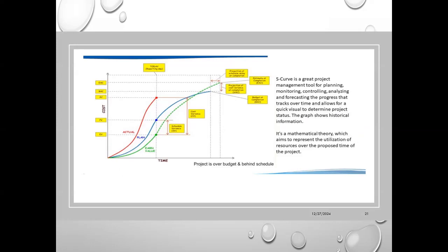Using Primavera, you can do earned value management. This is one of the important tools for progress monitoring and reporting. In earned value, we talk about the planned value at a particular cutoff date. Cutoff date means the day you take the measurement, and the actual cost you have spent on the project at that point in time, and the plan value, plan percentage at that time.